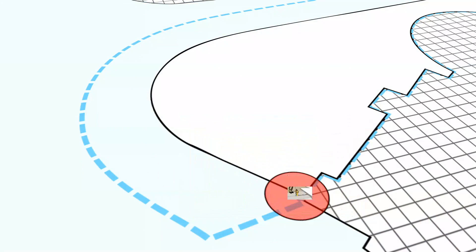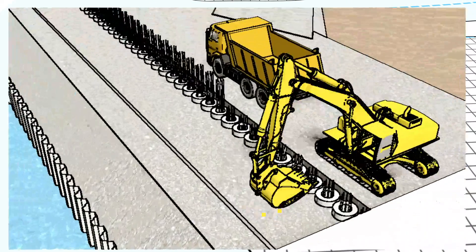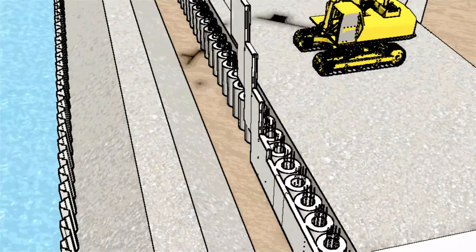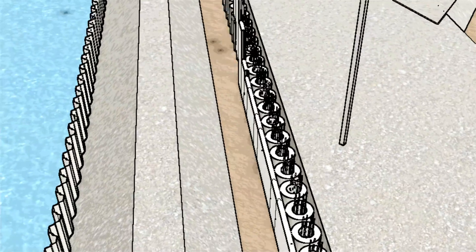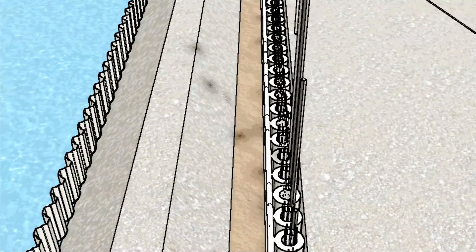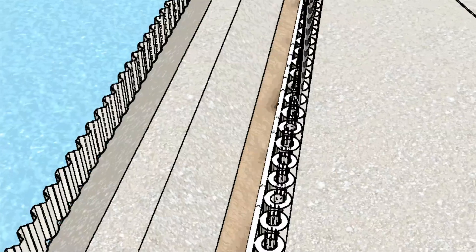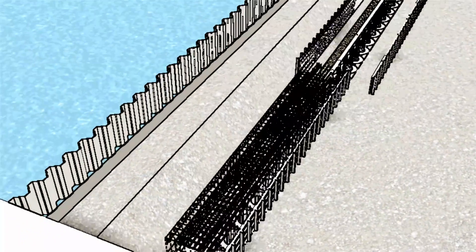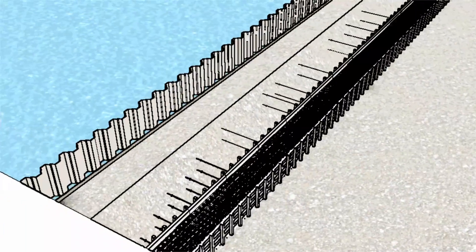When the piling has run about 50 meters or so, excavation can be carried out to install the precast facing panels at the riverside, while RC insert piles can be carried out at the landfill side to minimize backfill seepage. The capping beam construction then follows suit.